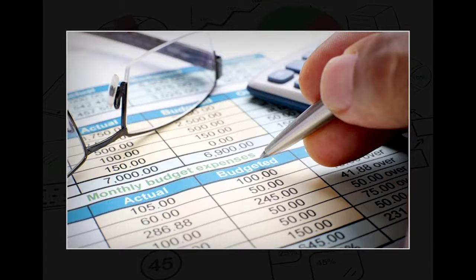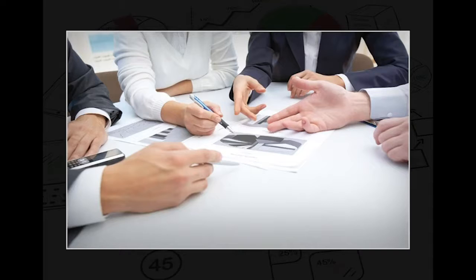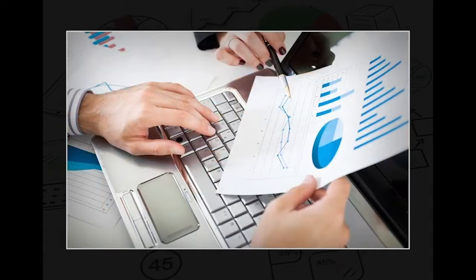Periodically, most typically at quarterly or 6 monthly intervals, a formal set of financial reports should be prepared to compare actual expenditure against the budget. The report should be prepared for the project as a whole and for individual partners if they are separately managed. Summary reports should also be prepared to analyze expenditure by category and by source of funds.